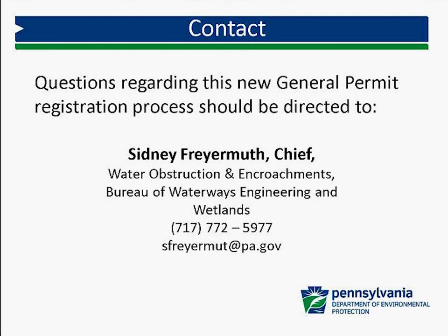For the joint permit application, will the USACE, Army Corps of Engineers, require their own version of the Aquatic Resource Impact Table? I can't answer for the Corps, but we did work with the Corps on this table, and they are in agreement to accept that for impacts that we need to report for them for SPGP purposes.